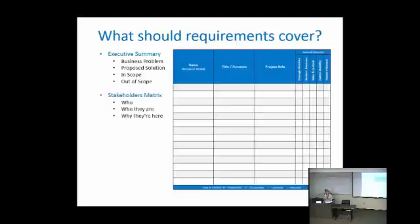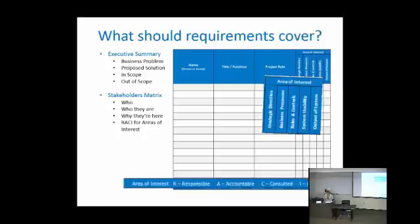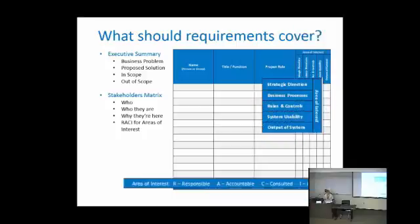Next, we want a stakeholder matrix. It should list who, their names, who they are in their real job. This is where they like to see their titles listed. And why they're here, who they are with regard to this project. If they are the SME, subject matter expert, if they are the project sponsor, or what their purpose is for being here. And then have a RACI chart. RACI is are they responsible, accountable, consulted, or just informed? And fill that in for the areas of interest.